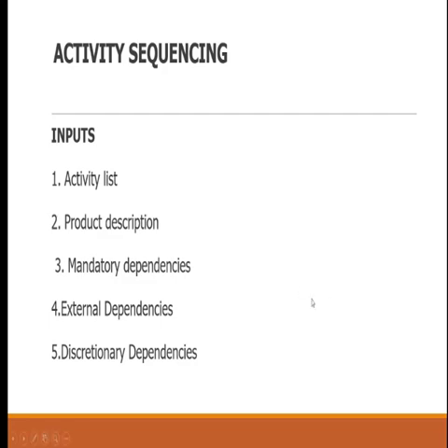All right. Number 3, we have mandatory factors. Check out factors that are a must. Start with the mandatory. You want to build a house, the first thing is not to start raising block from where? The first thing is what? Your foundation. Foundations are important before you start doing your lintel or whatever you want to do up there.